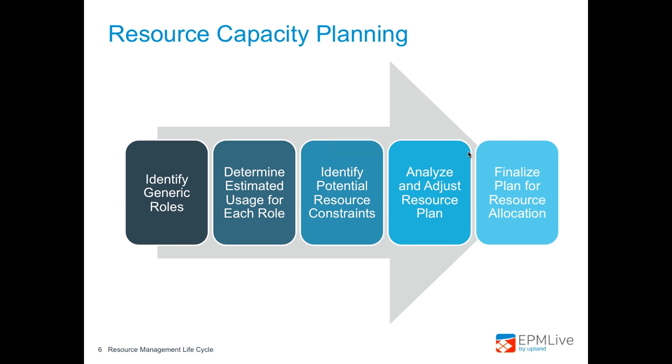Without the proper skill sets and expertise, particular tasks may require more training, therefore longer turn times, possibly even resulting in rework. So effective resource management relies on the fact that these factors have all been considered prior to selecting your resources. Once you've determined your generic roles, right?